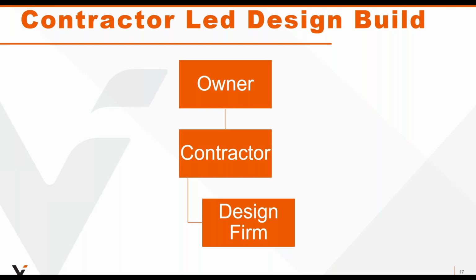Oftentimes in this industry, folks use things like 30% design drawings to get you to that stage where an experienced contractor will be able to do a reasonable construction estimate, do the quantity takeoffs, and put in a competitive bid. And we'll talk about some of those challenges shortly. If the bid is successful, then the design team will complete the design and move it forward.